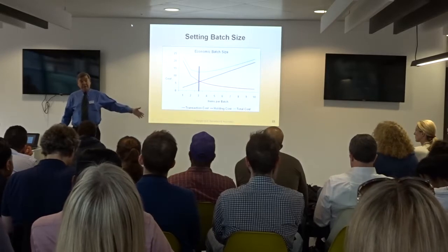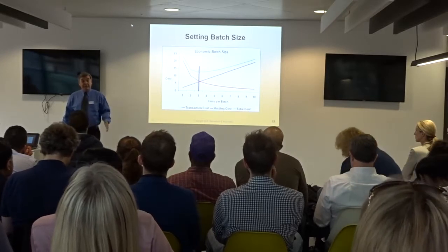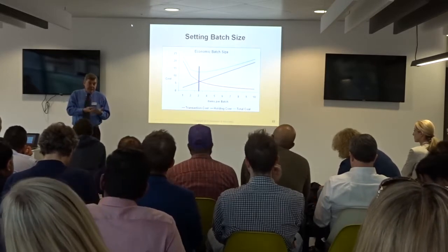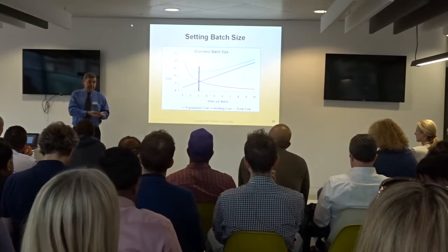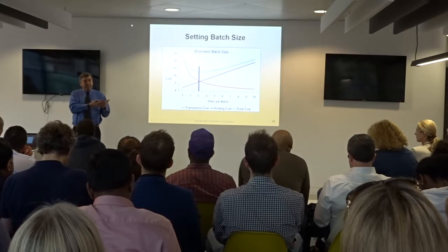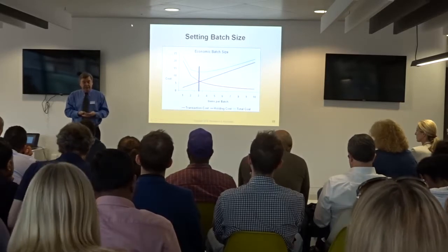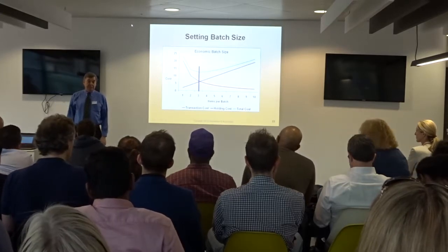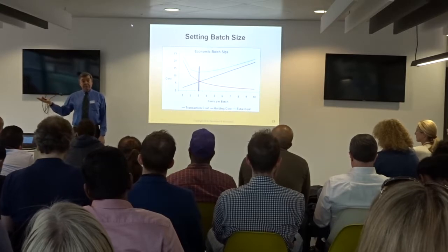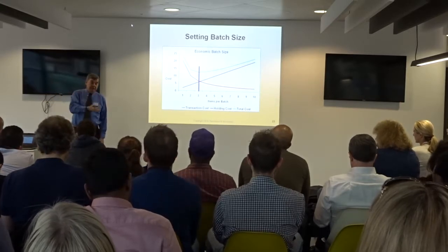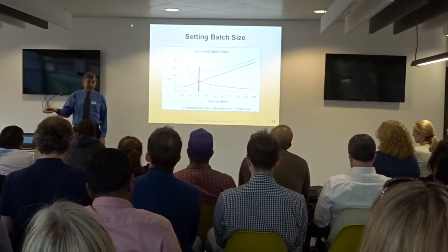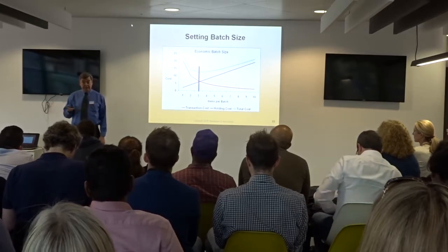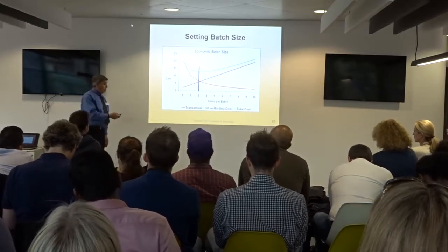And so they are deploying stories as soon as they're done in the sprint instead of waiting until the end of the sprint. And it's this transformation of driving down transaction costs that makes it effective to operate in small batches. And of course, the people who have fundamentally high transaction costs, like major regulatory approvals, if you're designing flight control software for the Boeing 777, you don't want to go through type certification more than once. So they intrinsically have to use a large batch deployment at the end of the process, but they do not have to use large batches in the writing of the code. They can still use small batches inside the process.